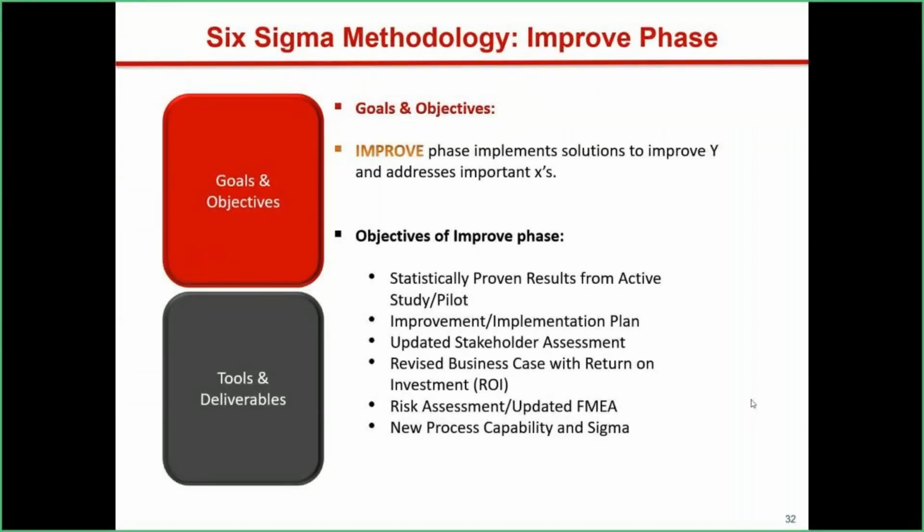Now, obviously, the whole idea of doing a project is to improve. How would you measure improvement? The best way, or the only way, should be that whatever is the output of the project, you should be able to quantify that in terms of money. How much money you're going to save, how much money you're going to make out of it.